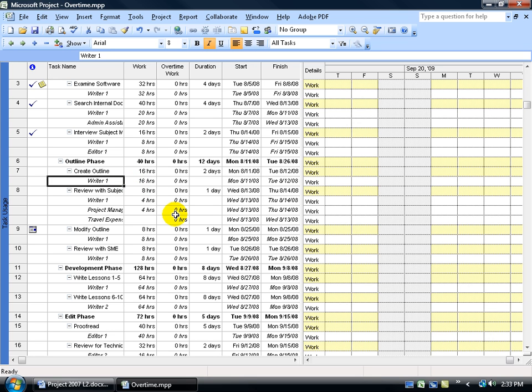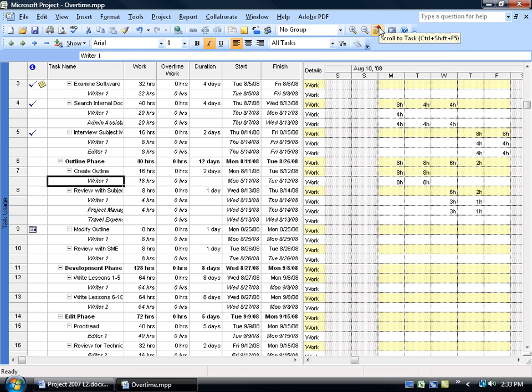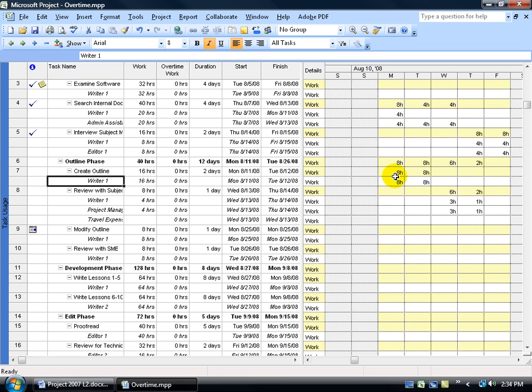We're looking at Rider 1 working on the task, create an outline. Now that I have the resource selected, I can come up here on the standard toolbar and click on scroll to the task. It takes me right to those two days, eight hours on Monday, eight hours on Tuesday. It gives me a total of 16 working hours that's been assigned to this resource.